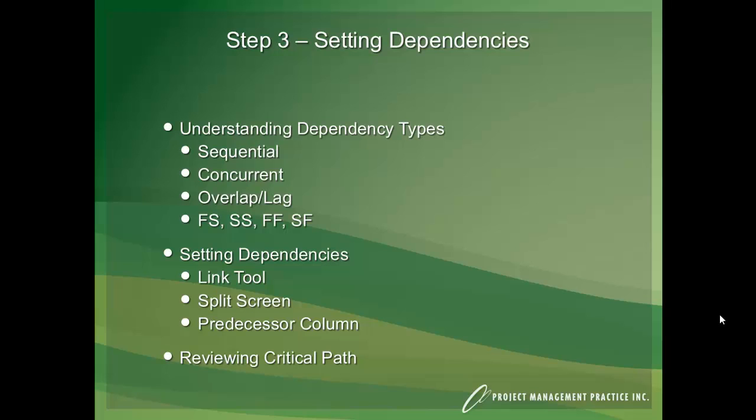And then Step 3 is really then sequencing those together or determining when they will occur and setting up your network or dependencies or links between the tasks. There are different types of scenarios that you'll go through. There are sequential scenarios where task 1 happens before task 2 and task 2 happens before task 3 and everything happens in sequence.